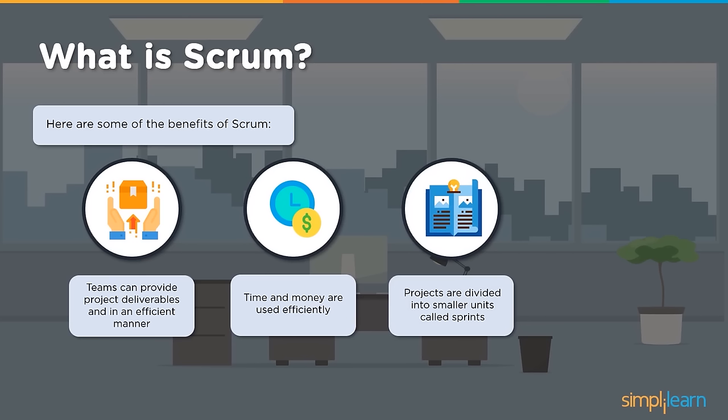It's a time-boxed iteration which will have a subset of the product backlog taken as a sprint backlog. Those user stories and epics are delivered as part of that sprint, and then reviewed on a daily basis as part of the daily Scrum meeting. We also have other meetings which will happen. When we look at the Scrum methodology and how this happens, I think we'll get better visibility.